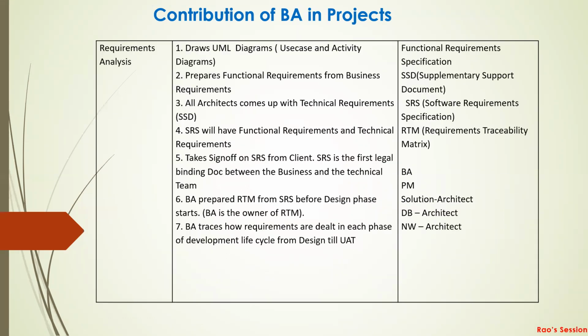And then requirement analysis. Here we model the requirements, where the project manager and also the architects will be part of this stage. Why the architects? They're going to define the architecture. So here we come up with the functional specification document and the supplementary support document; the SRS and the RTM are initiated here.